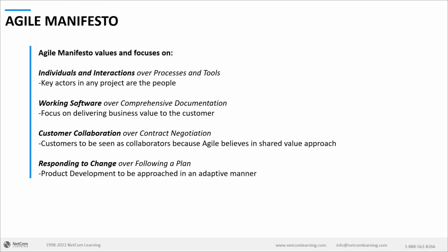So ideal situation, you want a situation where people, or you as a project manager, are responding to change. I'm not saying, again, that you are accepting anything and everything that is coming in and keep piling up the work? No. First things first, if you're a project manager, probably if you're using Scrum, then the term is going to be Scrum Master. The decision maker of what all change should be there, project managers or Scrum Masters have nothing to do with it. It's going to be the product owner.